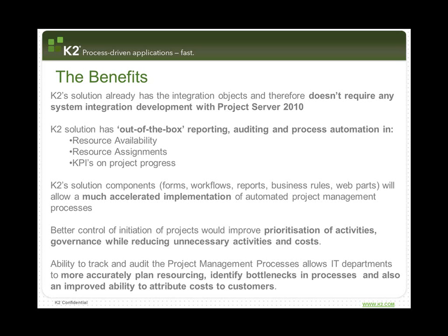We now have better control on the initiation of projects, so we can also take the user through a cycle of getting the project approved before we even actually kick off the tasks of assigning the tasks to the resources. I know if there's going to be any sort of budget spend within the company, we need to have almost a dual level sign off. Finance always wants to make sure that there's not space within the organization for fraud or anything like that. So we want someone from finance to sign off on projects and capital expenditure.